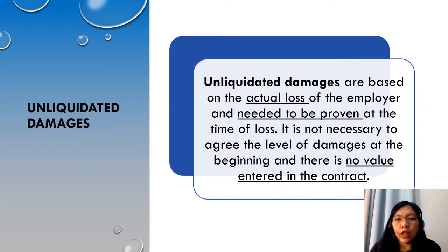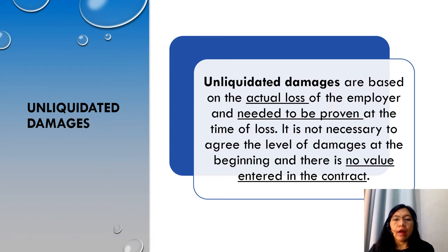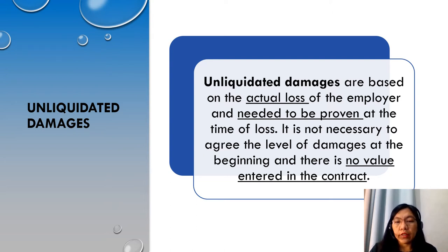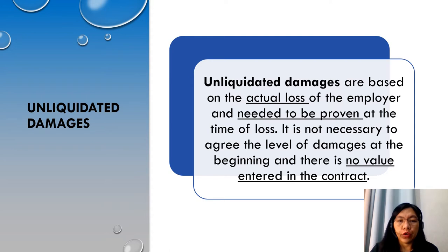The first is unliquidated damages. These damages are based on the actual loss of the employer and need to be proven at the time of loss. It is not necessary to agree the level of damages at the beginning or during the signing of the contract, and there is no value entered in the contract. The disadvantage of unliquidated damages is that the amount can be subject to lengthy discussions and calculations that may not result in agreement by both parties, as contractors and employers are expected to have different positions.